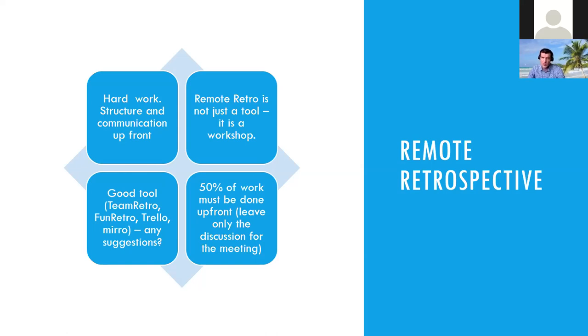So make sure that the things you'll be presenting and the tools you'll use are available and understandable for everybody. And it takes time. Even the review, which is quite simple, right? You would say it's just reporting the progress, but not necessarily. If you don't have the description of the tasks ready and the problem described in a proper way, that will lead to questions about what it was about. And that's a time killer because people remember it in a different way, and the same story repeats all over. So make sure you did it right the first time. If you see it's not, catch up between the ceremonies to make the descriptions better. It will really save your time and make your work easier.